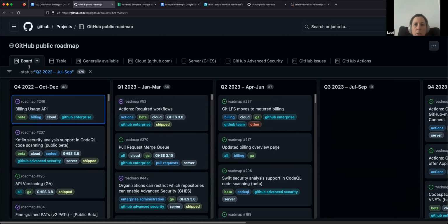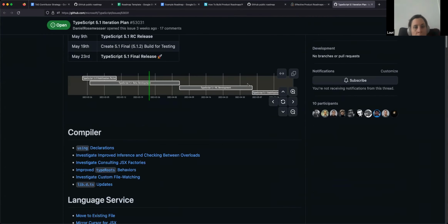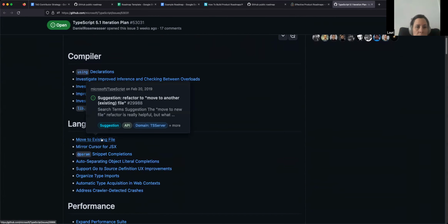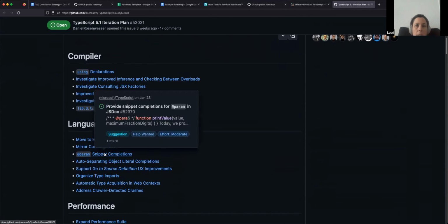And then that's kind of like your plan, it's kind of like an epic in Jira. It's a bigger body of work that requires many steps. You can put all of those issues that you identify in the breakdown in that description field, and then create a checklist. And as you finish things, you can just check each item off, or it will do it automatically.